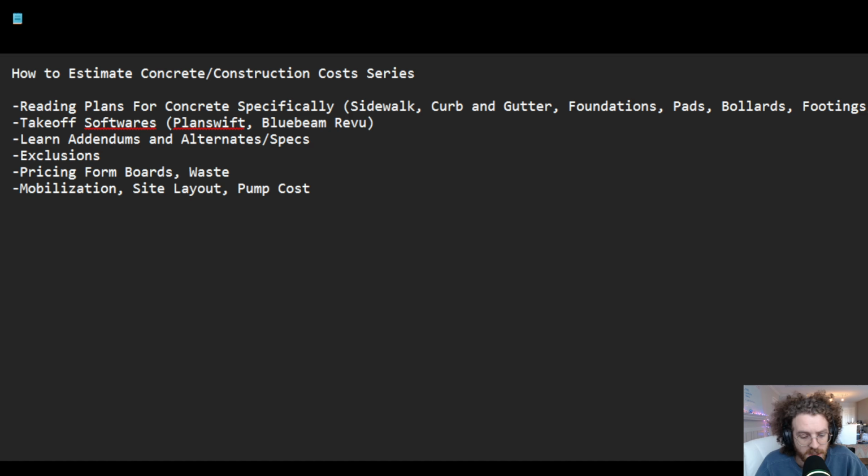I'm not doing those inlets. I can put those in a line item on my proposal under exclusions, which says all of my work is the work included above, but I specifically am leaving out inlets. So if a general contractor says, well, this guy's got the inlets, I can say, no, no, no. Look at my proposal. It says I excluded the inlets and you knew that. So that's just something to protect you.